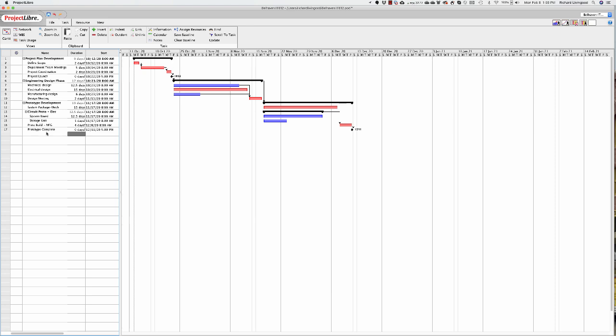Most milestones don't have a duration associated with them. They just happen at a certain day, a certain point in time, let's say. Based on the effect of all of the pieces of the plan or the project and all the tasks that are associated with it, when you place those milestones along that path, they will be associated with a specific date when they would take place, based on the time of all of the tasks that precede the milestone.